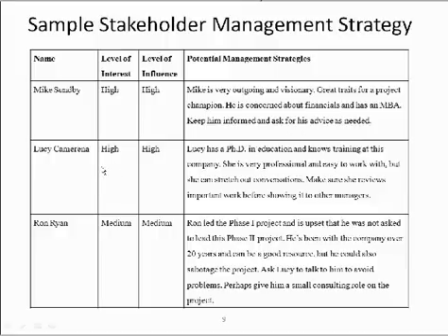Lucy Camarena, again, level of interest high, level of influence high. Lucy has a PhD in education and knows training at this company. Very professional. To help manage this, you need to make sure she reviews important work before showing it to other managers. And Ron Ryan, level of interest medium, level of influence medium.